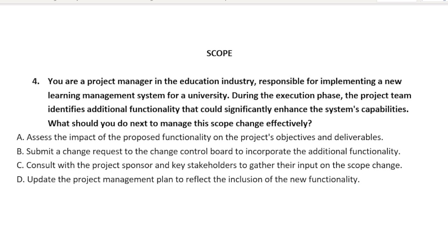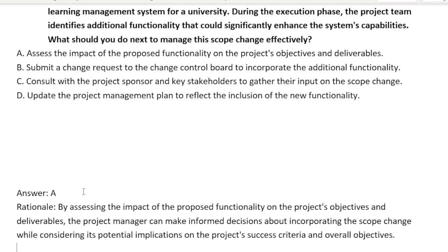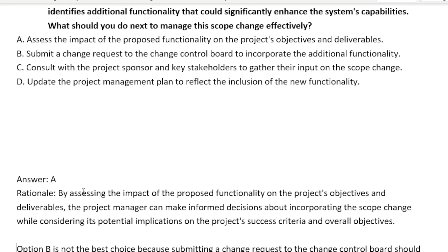When you have a proposed change, you don't just submit the change without considering the impact. You don't consult with the sponsor and key stakeholders to get their input on the scope change until you understand. C is like a quasi change control board, so it's really saying the same thing as B in a way. D you cannot do that until you've received the approval to update the plan. So the answer is A. By assessing the impact of the proposed functionality on the project's objectives and deliverables, the project manager can make informed decisions about incorporating the scope change.